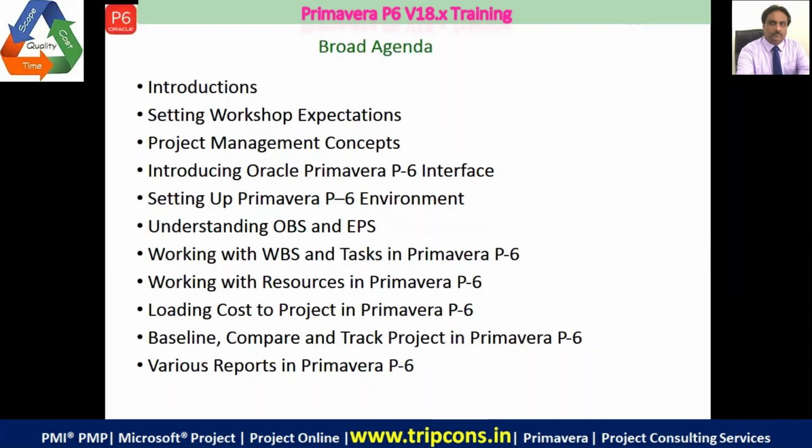Engineers, we should be able to plan and track the project so that we can keep within the constraints. Every project has a constraint of time, cost and resource, and that has to be set up before we start the project work. Once we have done that, we make sure that the project stays within the baselines. Baselines are of time, cost, resources.